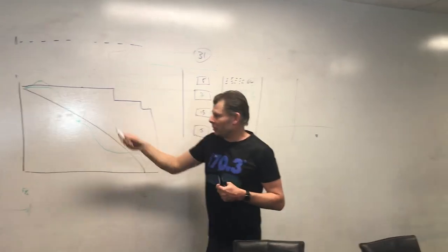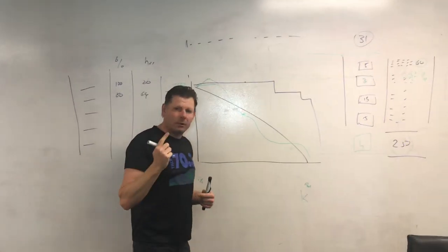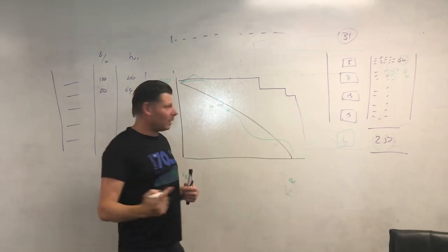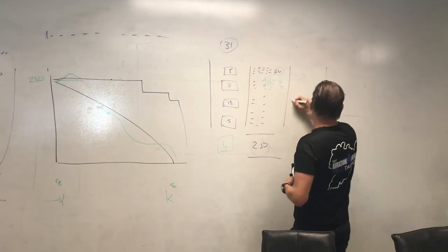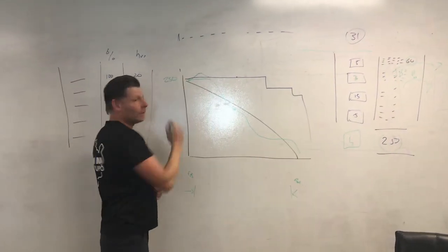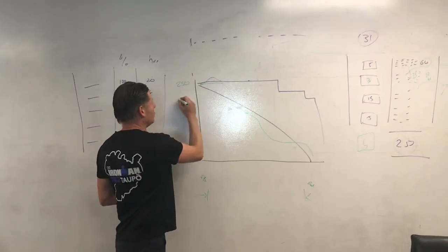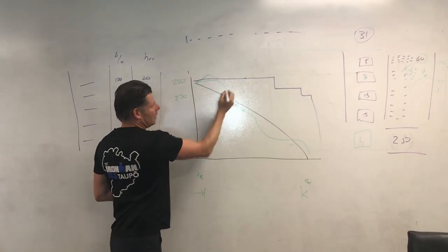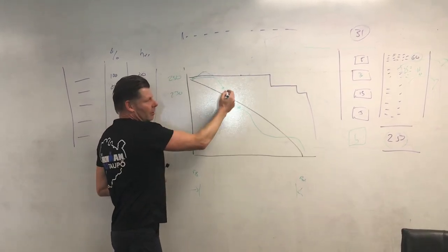This number then is used here. So we put 250 here. Then as we go through the sprint, on every daily scrum, every 24-hour plan, as stories get pushed into done over here, we start to burn down. So it starts at 250. If in the first day the team collectively takes away 20 hours, it's down to 230, which is somewhere here, and so on. So then what we can find is the work remaining.